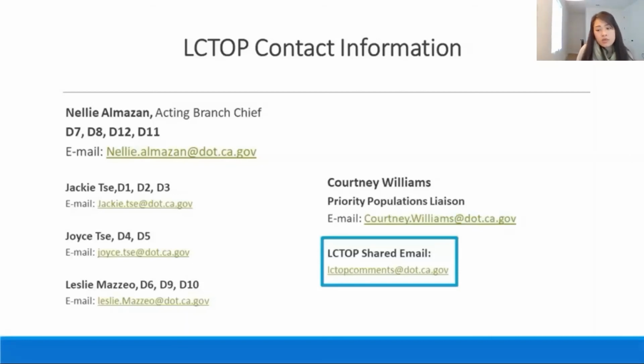We would ask for a quote potentially so that we have something to work off of. But general advice is to always overestimate what the total project cost is, since once you award the first year, you cannot go back and increase the total without substantially increasing the project scope to provide more benefits. But we can work on this offline.